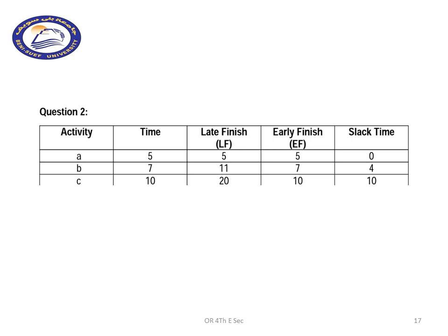You can find it at the circle written above that node. And the early finishing time you will calculate as the early start plus the duration of each activity, or you will find it at the rectangle before that activity.